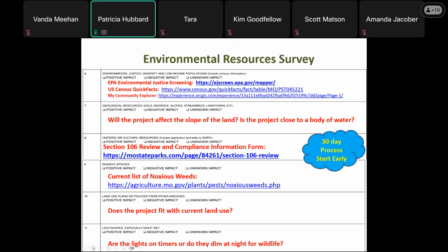So please work on this early. You should submit the SHPO packet as early as possible once you have a complete scope of work nailed down. Make sure that scope of work includes the accessible routes and the accessible parking. Do not wait until October to submit this form, or it may be too late to get a response back from SHPO.